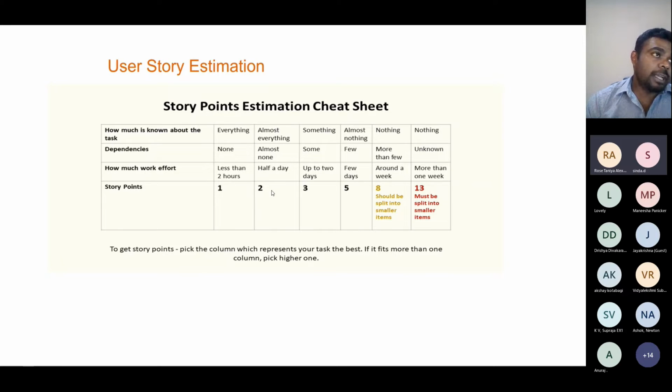And in the next sprint, I have committed 5 user stories, and each story also has 1 story point. That means now we have 10 story points in 2 sprints. And the third sprint is also the same, 5 user stories, and each one has 1 story point. So that means 15. So we are going to calculate 15 divided by 3, and our velocity is 5.